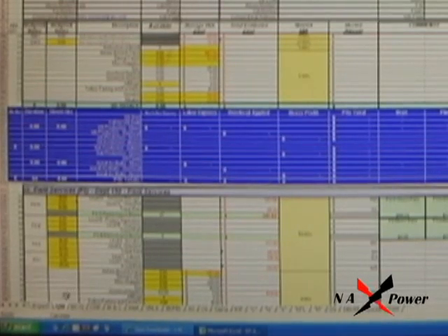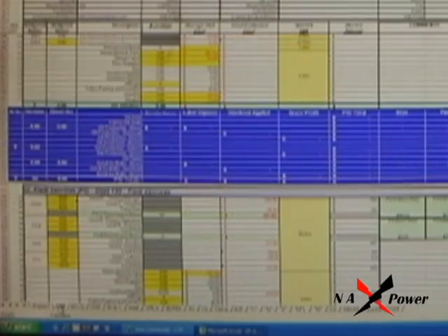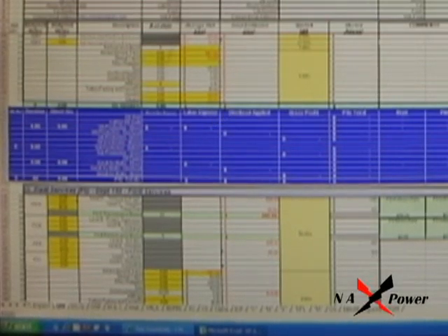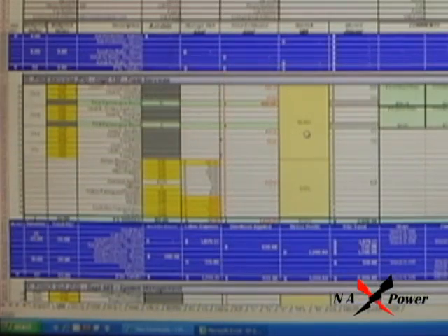If we wanted to change that crew size, we go back to the expect page, go to this yellow field, and enter a larger number of days, maybe 5 days, and go back to the QW field, hit your F9 to recalculate everything, and you can see the crew size now has gone down to 2. And that also modifies your cost structure slightly, so you sometimes get a cheaper price or a different margin. If you want to modify margins on a project, there's a lot of ways to go about that.